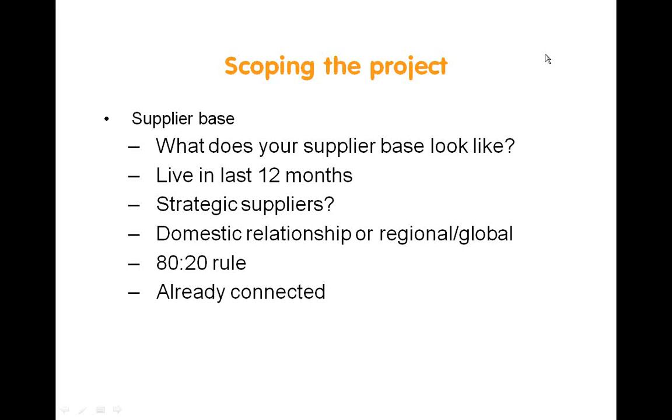Do become familiar with the 80-20 rule. Become very familiar with the 20% of suppliers that are sending you 80% of your invoice volume. They are the suppliers that are key to get on board.